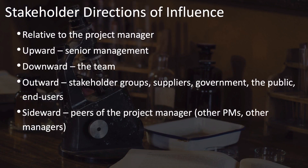What about these directions of influence? The directions are measured relative to you as the project manager. The upward direction is everyone above you in the organization — senior management. Downward from you is everyone on the project team. Outward are stakeholder groups and suppliers, including government, the public, and end users affected by the project. Sideward are stakeholders who are your peers — other project managers and functional managers. These sideward stakeholders are important not only because they can provide valuable insights, information, help, and resources, but also because they can compete for the scarce project resources that you need.